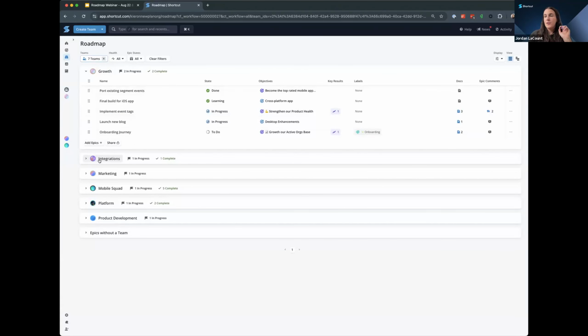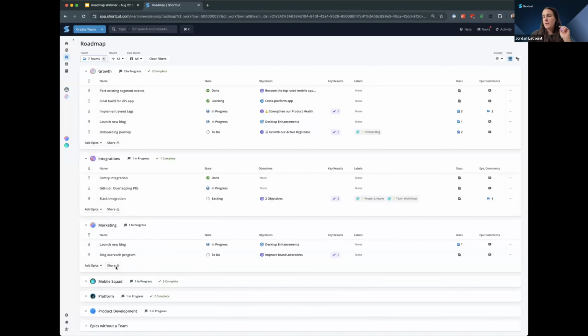And as you can see here, these are much smaller scopes. What we like to focus on here on the team roadmaps, or these delivery roadmaps, is current work in progress and on-deck items. So the list remains really small and focused. It's easy to not make guarantees or promises too far in advance and really swarm around the current efforts and get them out the door. And so we don't have things that are dragging along for many months because they're just hanging out on the roadmap.